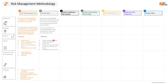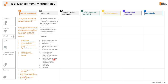Some project documents we will use include the assumption log, cost estimates, and duration estimates. We will also need the agreements and contracts already signed with vendors or third parties — procurement documentation will be a potential source for identifying project risks — along with enterprise environmental factors and organizational process assets. Tools and techniques include expert judgment, data gathering techniques like brainstorming sessions, checklists, and interviews, data analysis techniques like root cause analysis, SWOT analysis (strengths, weaknesses, opportunities, and threats), document analysis, assumption and constraint analysis, facilitation, prompt lists, and meetings.